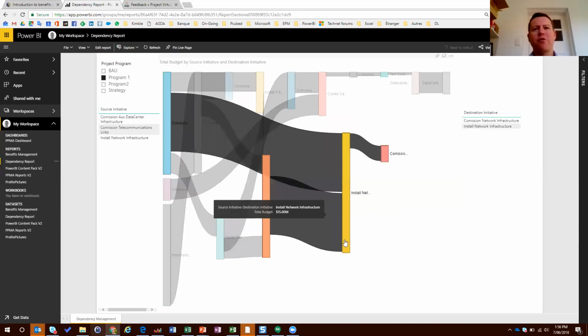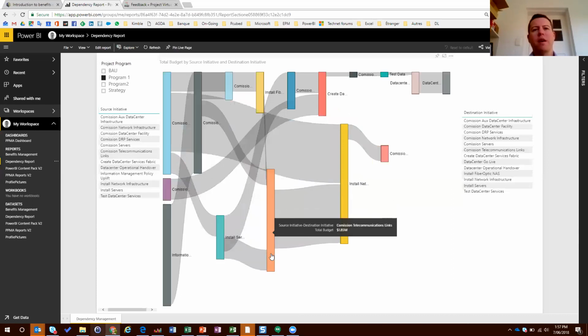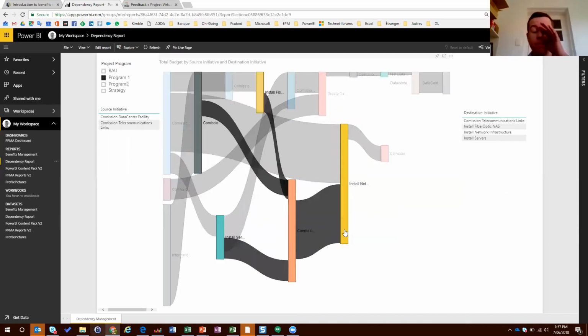So I just wanted to show you the power, because I love Power BI, and I just wanted to show you a little bit of Power BI as well, to track benefits, but also to track the dependencies between projects, and eventually putting all that together, which I had no time to do here, so that if you have a benefit or a deliverable which is getting late, you'll be able then to highlight or to make sure that the benefits are aligned to these new deliverable dates.